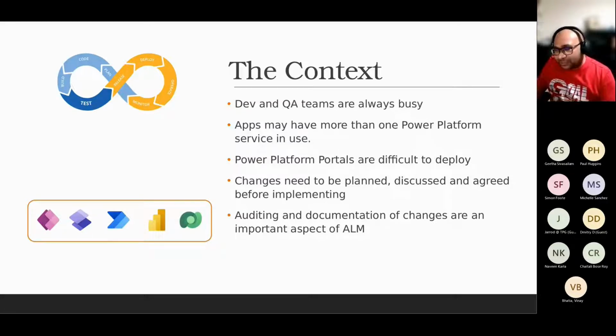Changes, and this is very important in large scale enterprise applications, change management is an extremely important element. We cannot change things just because we want to change them. It needs to be planned, it needs to be discussed, and it needs to be agreed. It needs to go through a level of scrutiny before it even becomes a development thing, right?